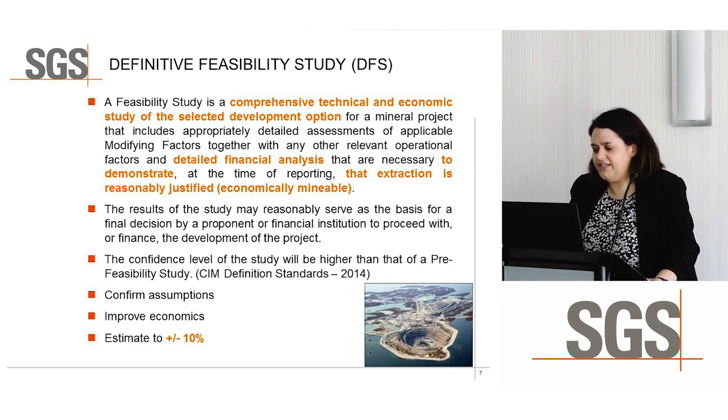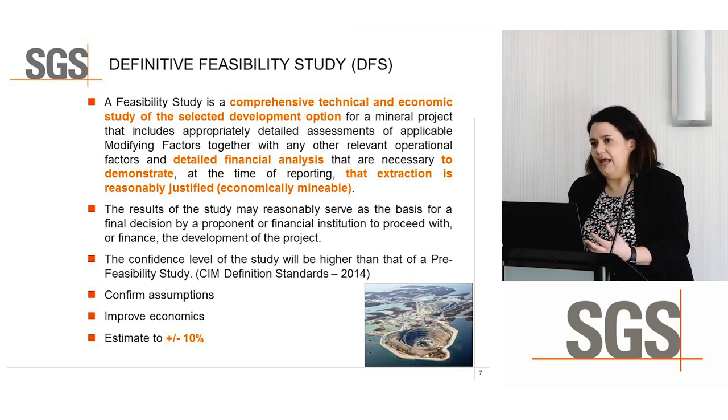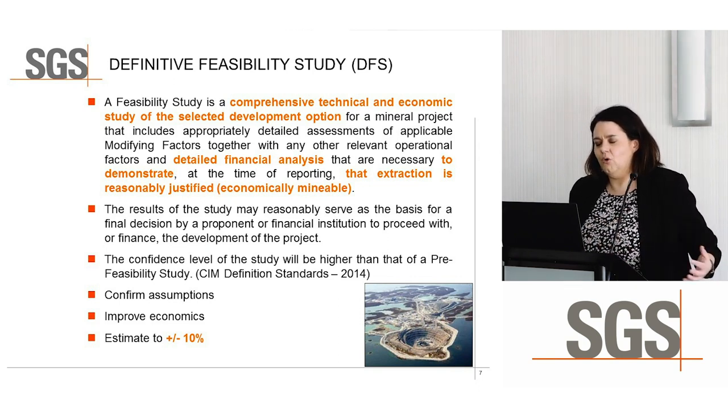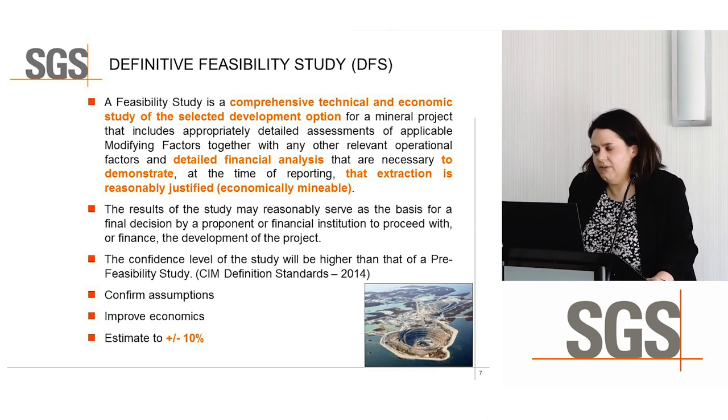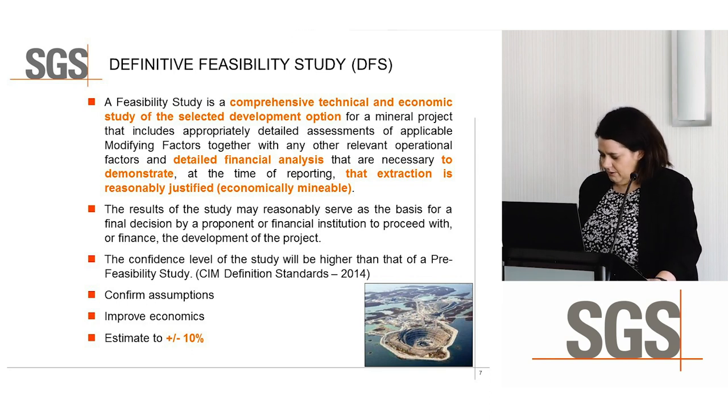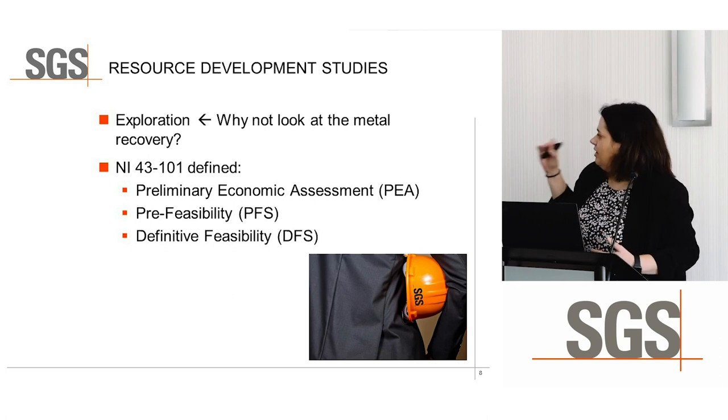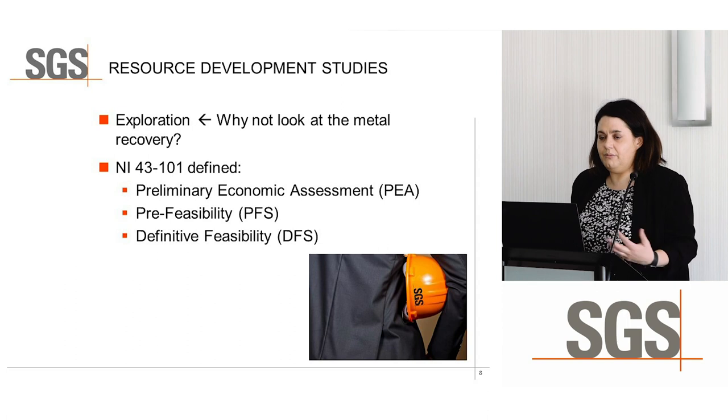The confidence level of this study will be higher than that of a PFS. So now what we're doing is we're confirming assumptions, we're improving the economics. At this point, from a metallurgical perspective, you're doing a lot of met work to tweak your flow sheet, but then you get onto the pilot plant. So you're now starting to look at more bulk tonnage and look at how the ore body is going to recover, basically, the metal recovery. So just to summarize, this is how it's defined, the PEA through the PFS and the DFS from a metallurgical perspective.